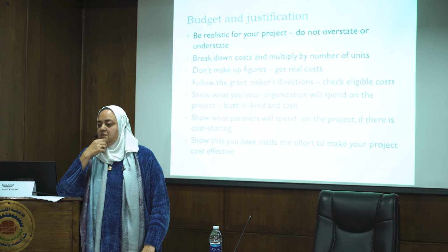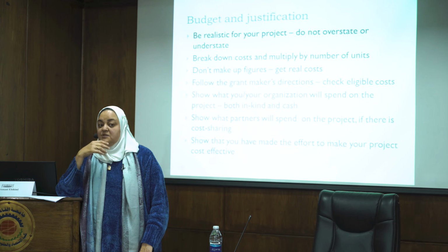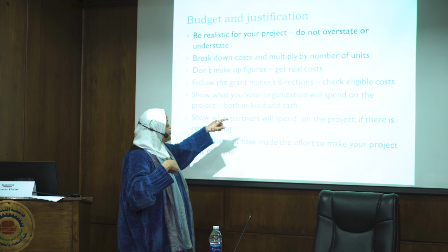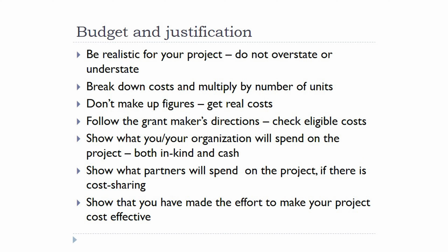Other people are interested in this, okay? So you show cost sharing. You show in-kind contributions. If Fulbright gave me, for example, free access to internet and free laptops to use, even though they didn't pay, they gave me in-kind contributions. I show that as well.